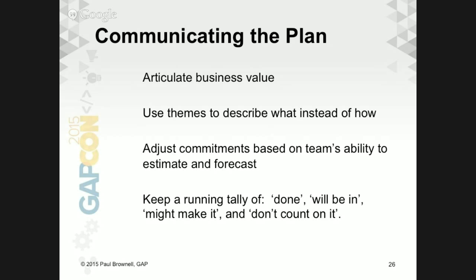Yeah, what I think is common practice is really at a release level to do the mock-up and user experience. So early in the release, you mock up the entire workflow and user experience for that whole release.